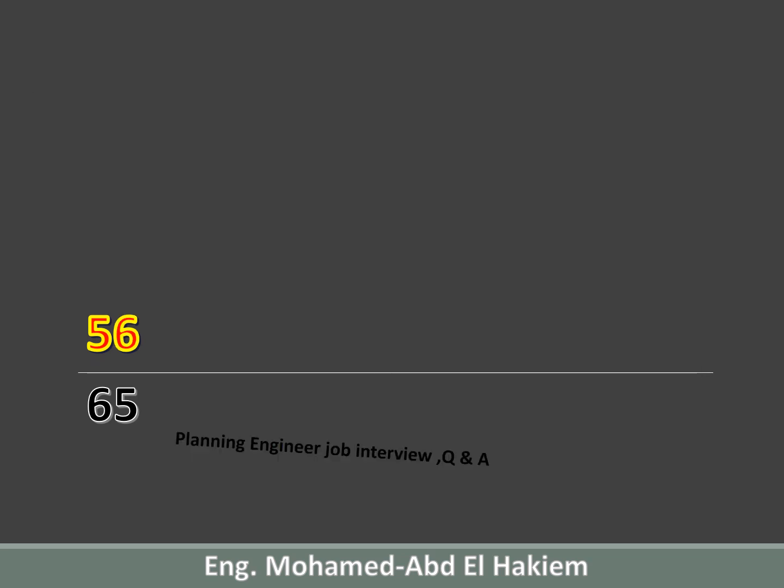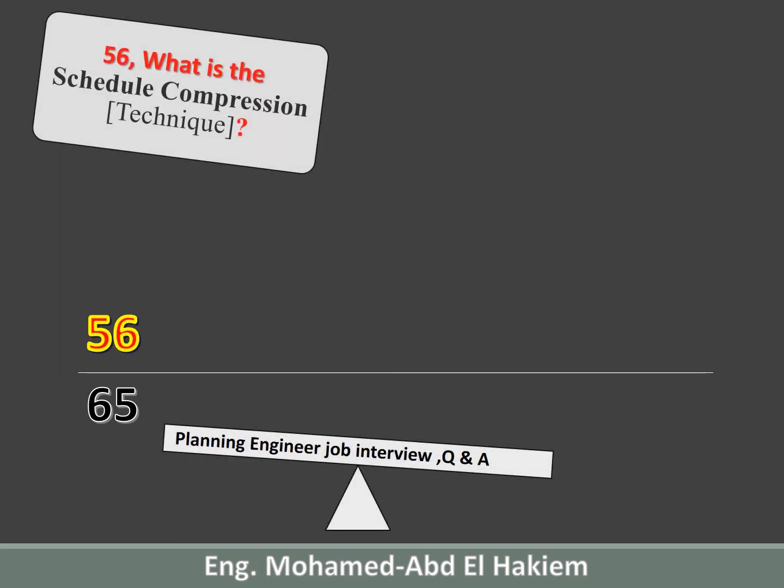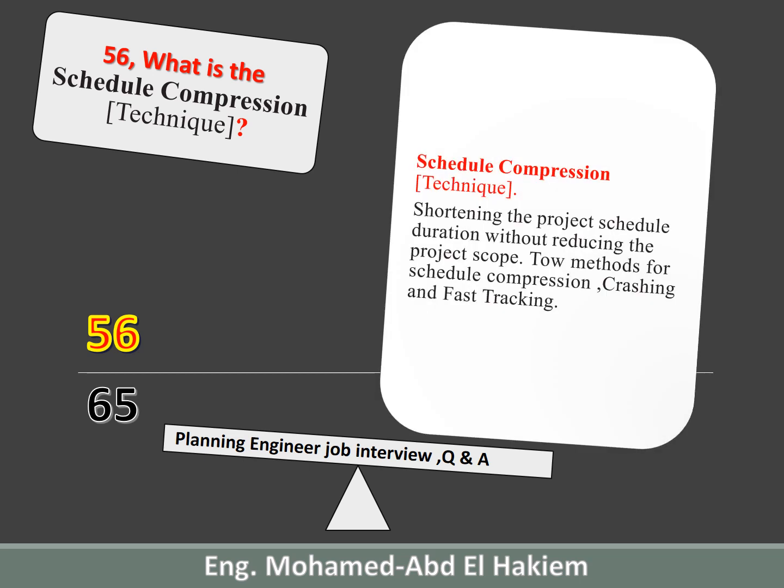56. What is the schedule compression? Schedule compression, shortening the project schedule duration without reducing the project scope. Two methods for schedule compression: crashing and fast tracking.